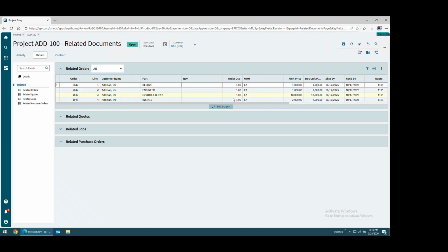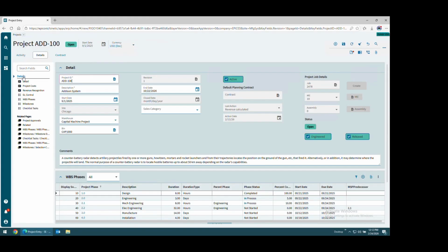So one common practice or best practice potentially could be to structure a project so that it matches that same contract line structure. That doesn't necessarily mean that's the only way to do it, but it does provide very good clarity for the cost objectives, right? So as we are incurring costs associated to the design effort, we can tie our contract line specifically to that phase, while still having the ability to further break it down in other subcategories if necessary. So that's just an example of how we can tie those two together in a very clear way.